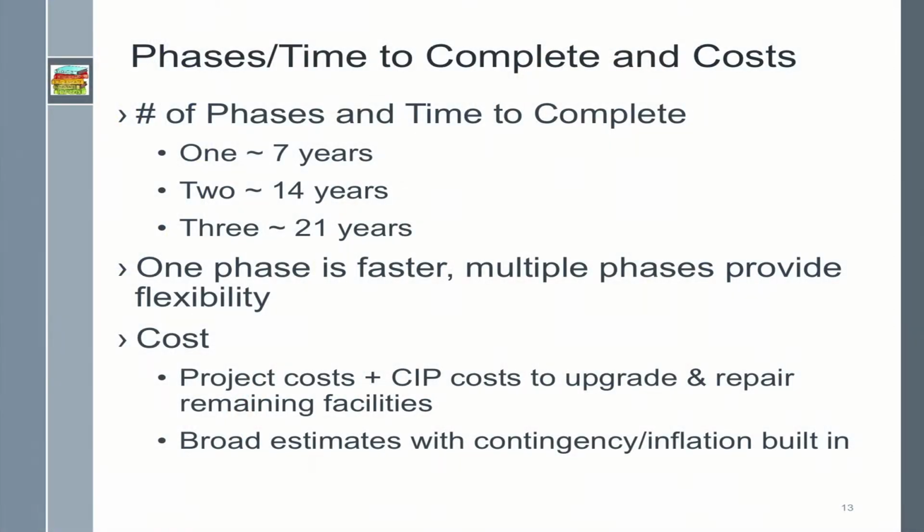The costs that we show for each option include the project costs, but also the capital improvement costs to upgrade and repair the remaining facilities throughout the district. Note that at this time, these are really broad estimates with contingency and inflation costs built in.